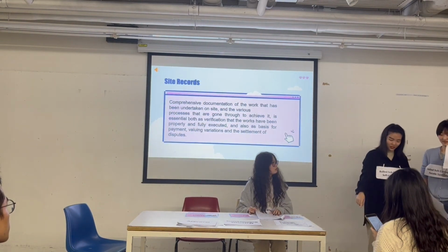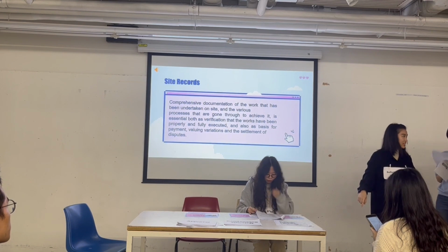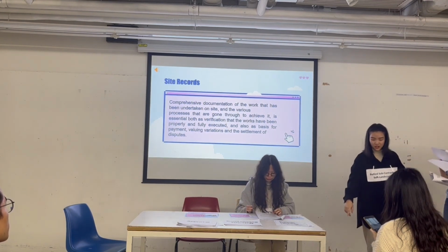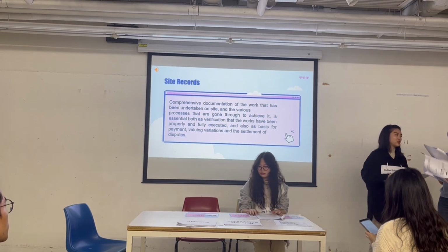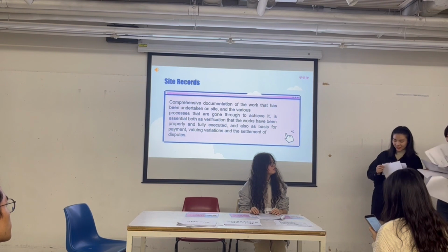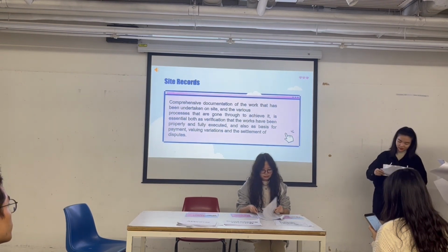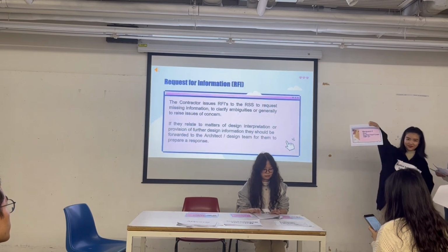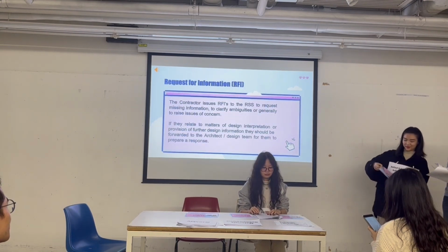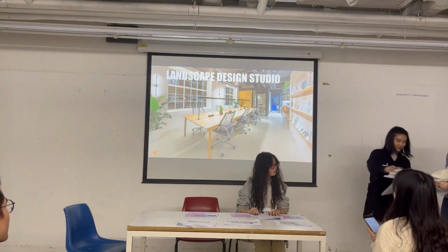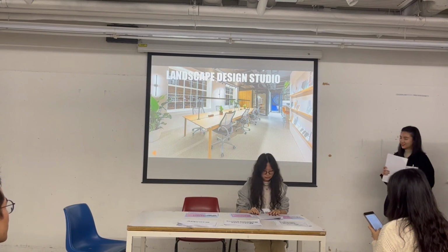Hold on, there's a marked structure here that will affect some work. So what happened, why is the current situation different from the original site drawings? Seems to be a design-related problem. You need to submit a request for information to the landscape architect. He will give you a professional solution. Okay. I will help you to hand it to the landscape architect.